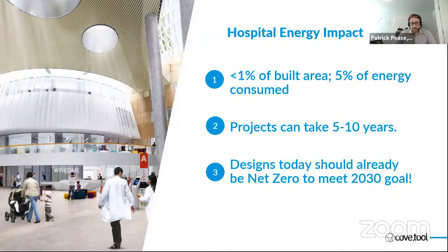Another key aspect of them is projects to build a new hospital take a long time, anywhere between, say, 5 to 10 years for a project to go from concept to completion, to even more, 20 years for a hospital if it's very, very large is not unheard of. And that means that if we're designing for net zero by 2030, which is a goal a lot of firms and a lot of people have bought into, designs today, in fact some designs yesterday, needed to already be net zero.